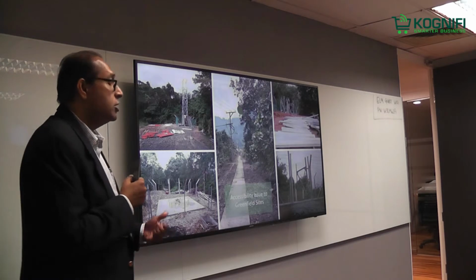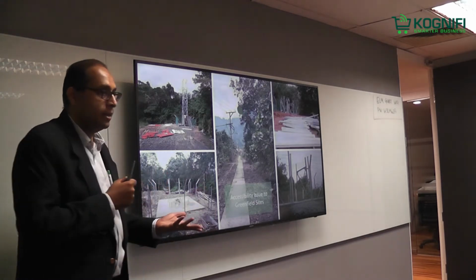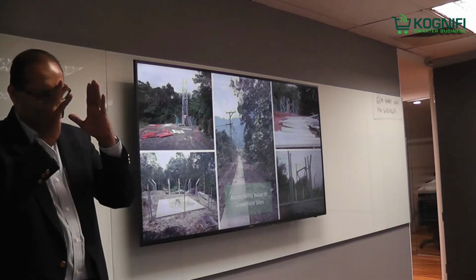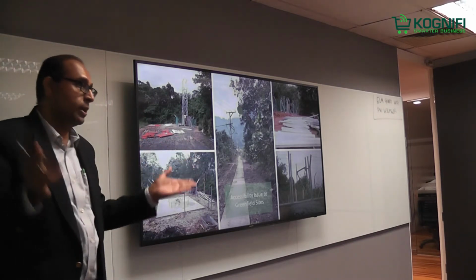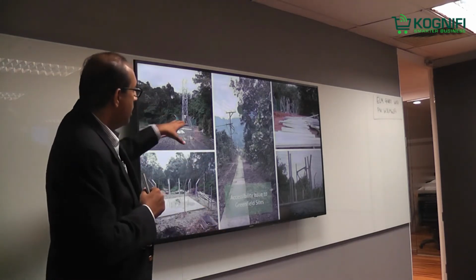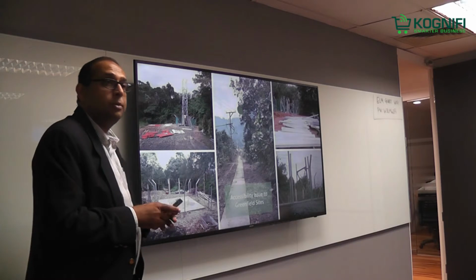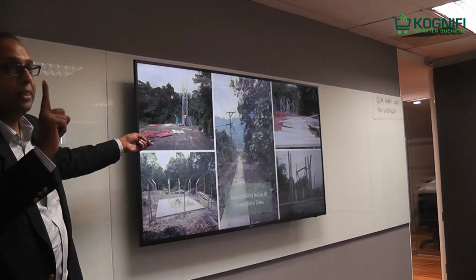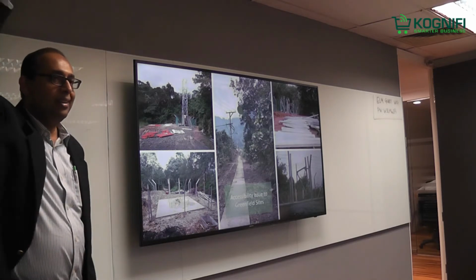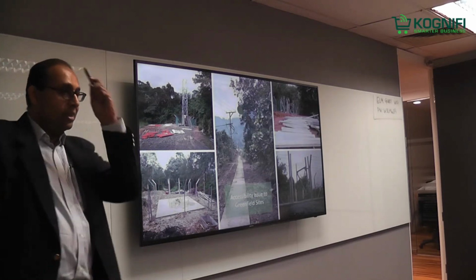We use digital tools to do topography studies and check for any physical hills or mountains. So we did that digitally, and we came here. We have to bring a crane here. Can you imagine bringing a crane here? One of the methods is a crane. Another method is to bring a guy with a balloon, and they release the balloon, and then from the collector tower, we try and see the balloon.